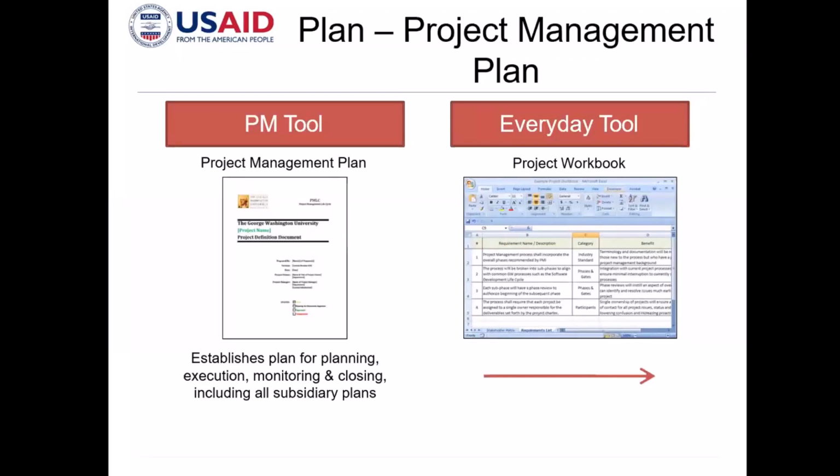Once you go to the project plan, those high-level scheduling and costing will have to be the final one. And every schedule should be detailed, right? So each and every major activity, tasks, and sub-tasks will now have to be included in your project schedule. So that's the major difference of a project charter to your project plan.